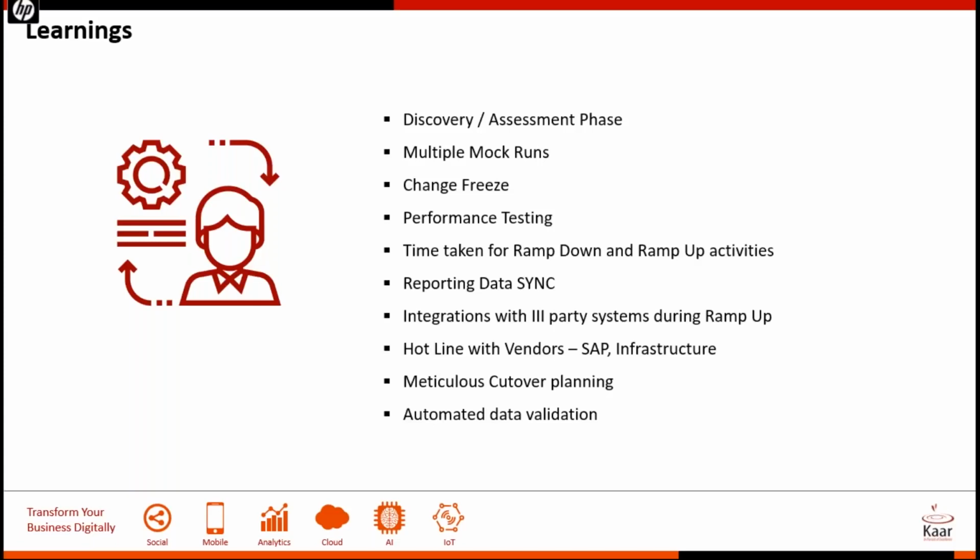Why are multiple mock runs required? So the first time I said you take a copy of development, put it into the sandbox, and do these tasks. Possibly the first conversion could take 3 weeks or maybe 3 to 4 weeks. And then when you do the development, it should take a shorter period. And in this period, you're already adapting your custom code.